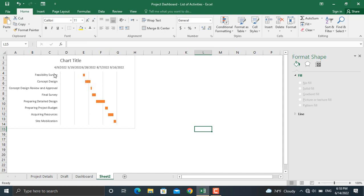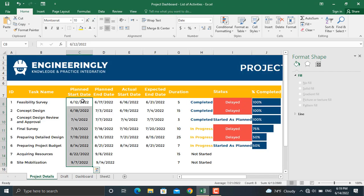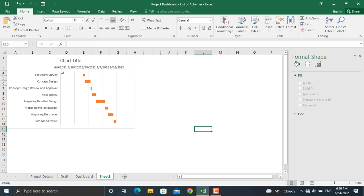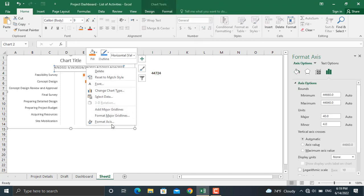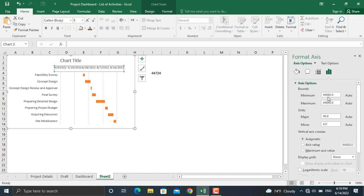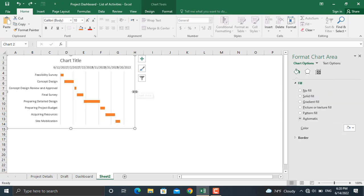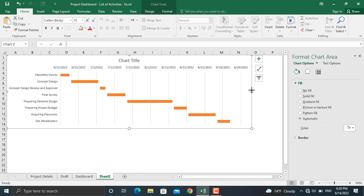Next, we need to bring the Gantt chart start date closer to the first activity. As you can see, the start date is showing 9th of April 2022, but our project starts on 12th of June 2022. We type 12th of June 2022 and change it to General format, giving us 44,724. Right-click the axis, select Format Axis, and set the minimum value to 44,724. Then drag the chart to make it bigger and change the title to 'Project Gantt Chart'.